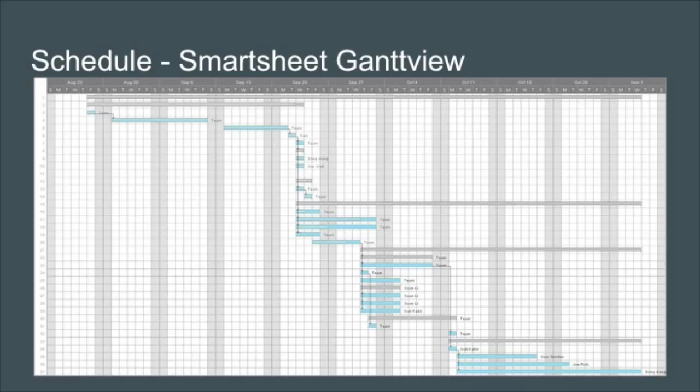The Smartsheet can also be viewed in a Gantt style, where you can identify the critical path, which allows us to visually see the work that must be done over time. The critical path takes into account the start and finishing dates, as well as the predecessors, which display all the work that can be done in parallel to achieve the shortest path.